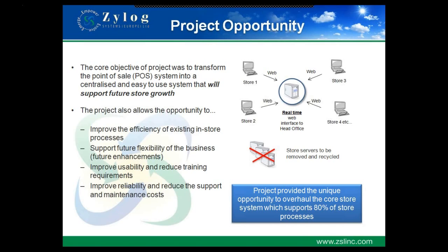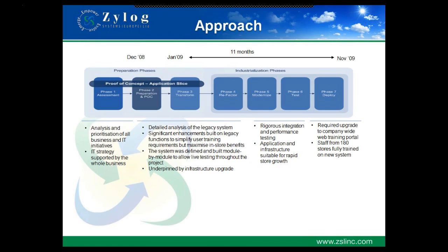Right. Next slide, please. One of the approaches we took was the right shoring model that Srini mentioned earlier. Initially, we commissioned a very low-cost POC for the client. We had a 5-week study just to prove that the approach and the target technology will work for the client's unique requirements.